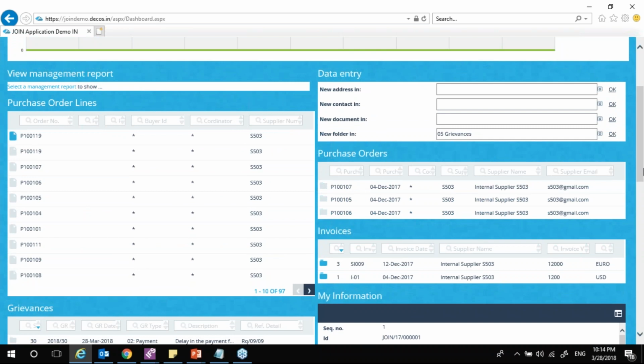Yes, it can be. In fact, we are currently implementing it for our customer called Arya Soul in Iran. Now they want the supplier portal to work as a finalization for the statement of work. Once the statement of work is finalized with them, only then would they like the purchase order to be released in IFS. So it can be used for finalization of statement of work or any other contract documentation that you're having with the supplier.